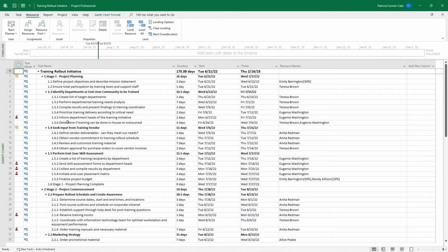And this is pretty typical. Sometimes when you just level your resources like we did, it fixes everything. Other times it doesn't. So this time, we're going to make note of where we are now with the duration. So it's pushed out our project, and its finish date is pushed out as well as its duration is expanded. And so this time, I'm going to click the Level All button, and it gets rid of everything. It also pushed it out by another 4 days, okay?